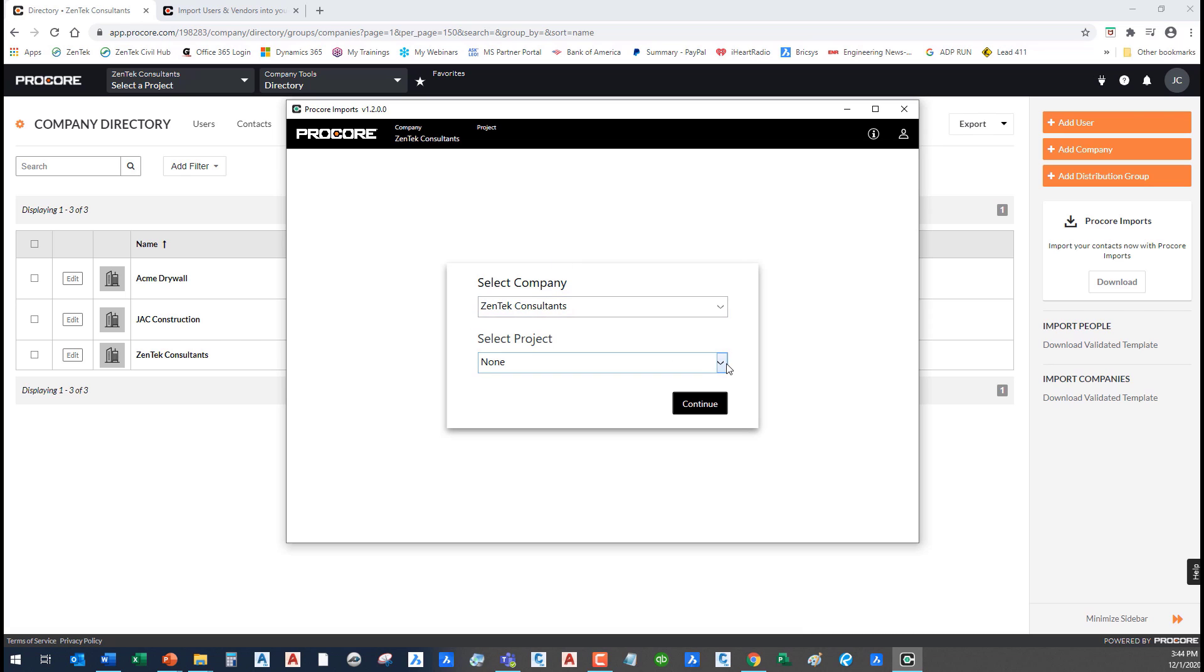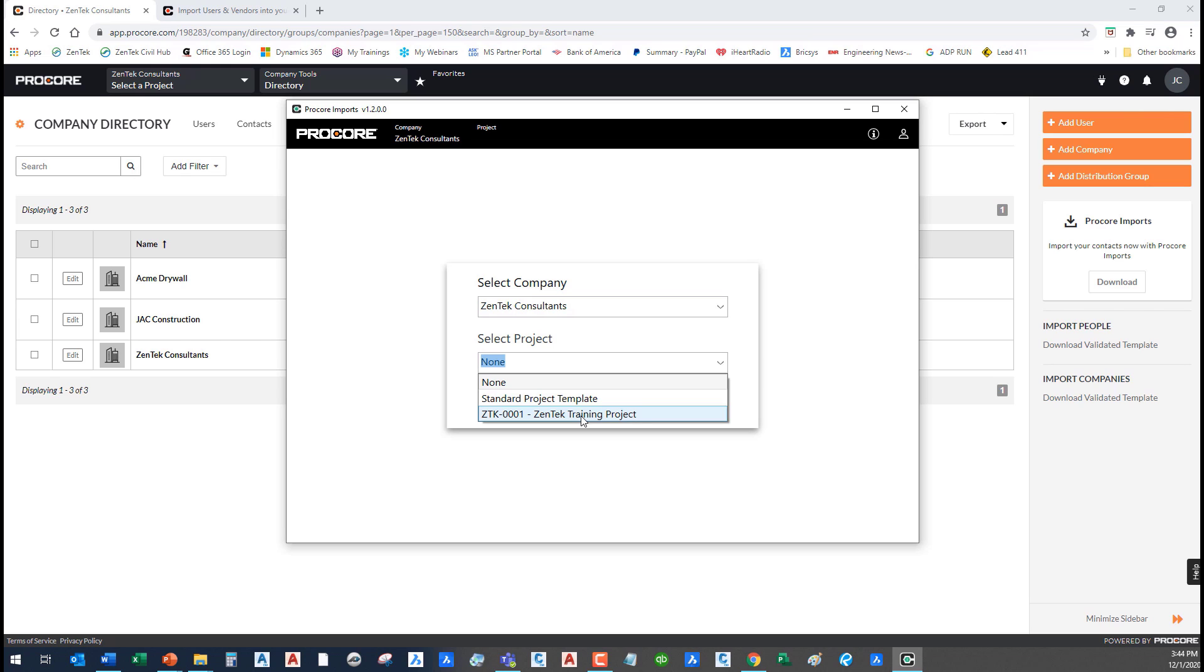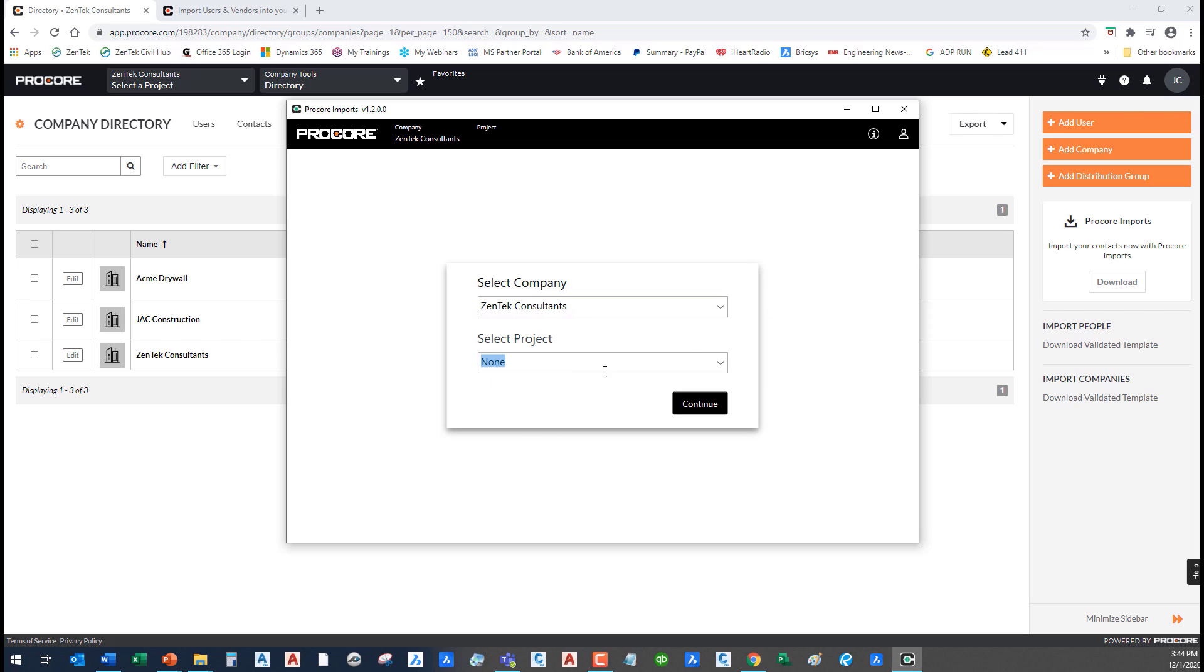Then it brings up this box where it's going to ask you to select your company name that you're going to import to, which is easy enough. It also gives you the option to select the project. For example, if I were to select my Zentech training project at this point, not only would it import all of my new vendors and companies to the company level directory, but would at the same time create a duplicate of them and assign them to my project level, so those same vendors would be available and billable people on this current project. I'm going to choose none, I'm just going to bring everything in at the company level.